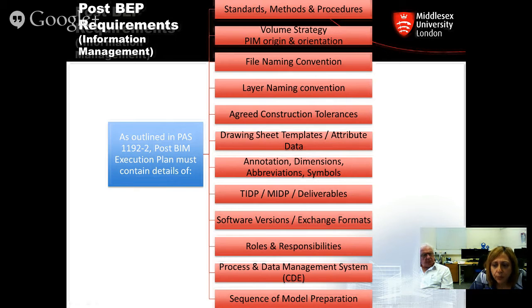Mervyn was saying a particularly important thing last time, and I commented on it in the email that I sent everybody, that within the phase where a team is working, within that particular time, that team has ownership of the models that they are working on, just during the time when they are working on them, because they should be held liable for what they put in those models. But in the very end, all ownership of models should go to the client, unless otherwise specified in the contract.